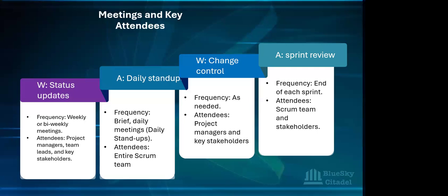Another meeting that you have in Waterfall is change control meetings, and this is as needed. If there is a change that needs to be raised or something needs to be changed, that meeting will be held, and again it will involve project managers and stakeholders to review and approve or reject proposed changes.